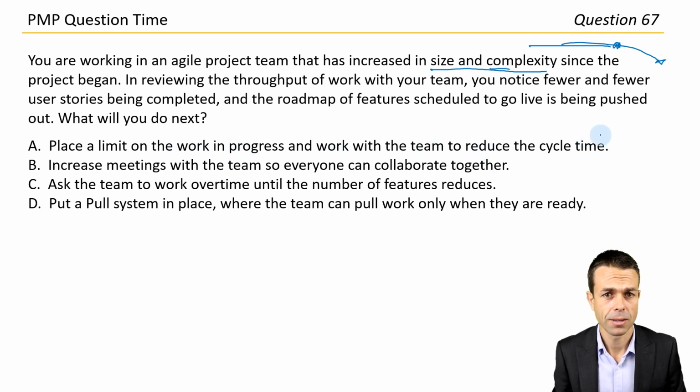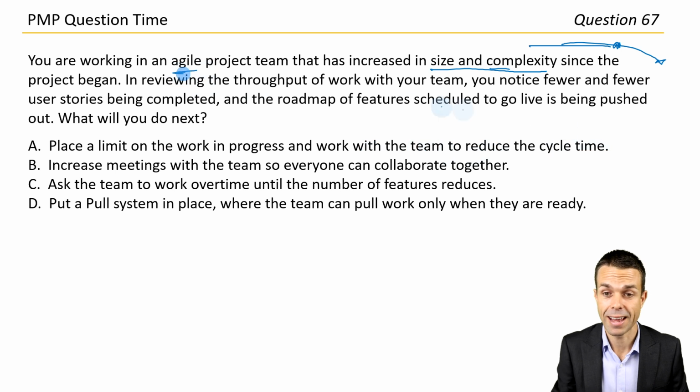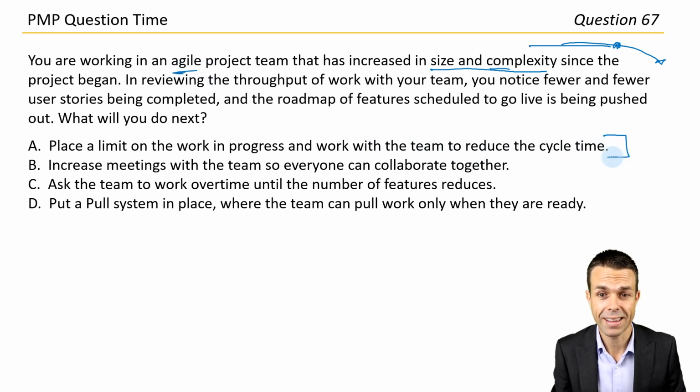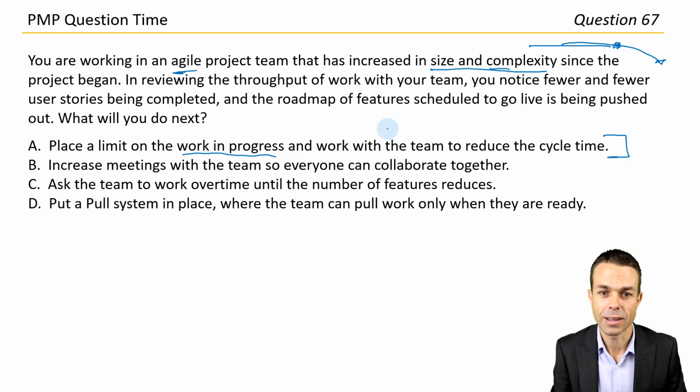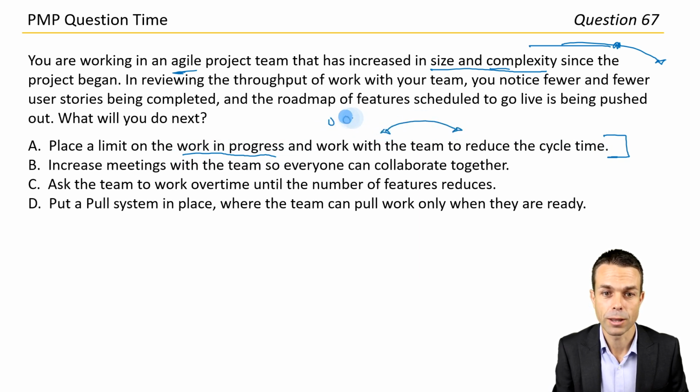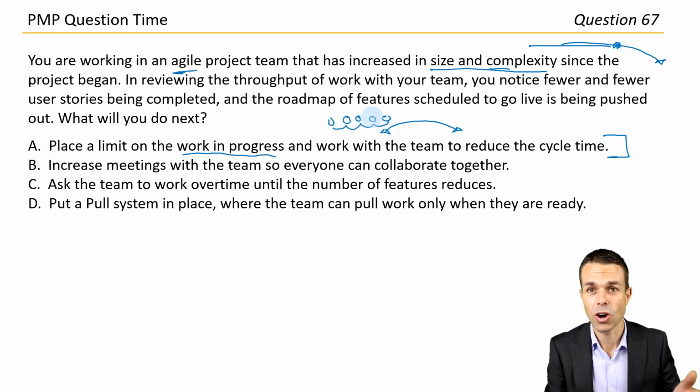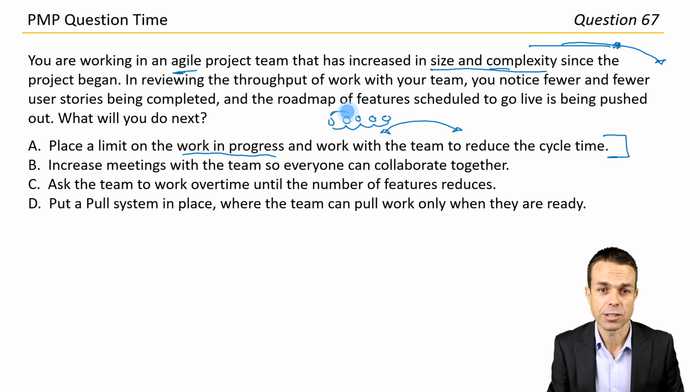Okay. Agile team, that's certainly an Agile-centric wording there. So the work in progress, that could work from a context switching perspective. If we've got too many things that we're working on and we're switching between these every day, then it takes time to get back up to speed on each different feature.